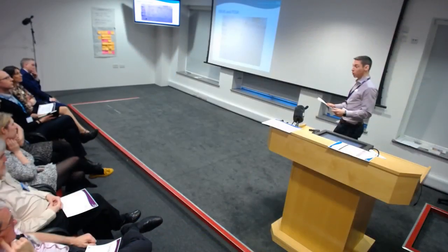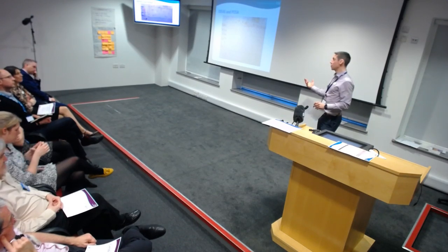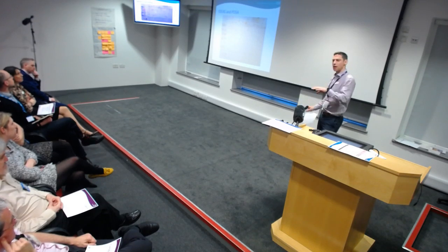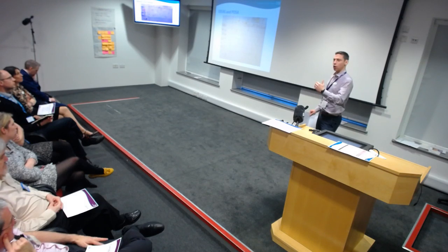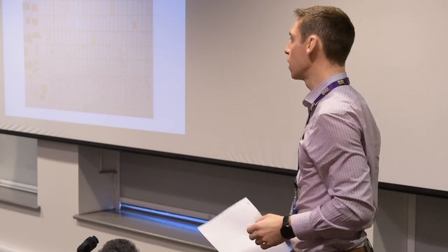So our commitment was to standardise it, you'll be pleased to know. Simple things like agreeing the legend and the key, how we're going to represent all the work on there, and then tie that back into our huddles. So not every day, because things don't change usually that often, but weekly on a Friday we now look 3 weeks ahead, what's coming up. We should have a check-in on the roles and responsibilities that have been assigned, and we're also quite fortunate that our wall's magnetic, so we can put some simple visuals on to draw attention to things that might not be quite all set in order.